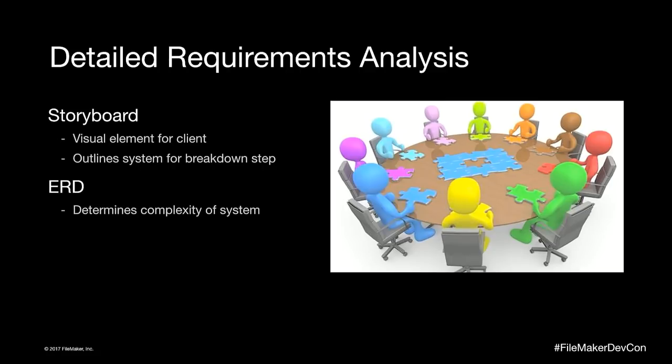So after you do all the asking and listening and writing down your notes, then you're going to do your detailed requirement analysis. And that's where you're going to put together your storyboard, you're going to put together your ERD so you can tell how complex the system is going to be, and we're going to talk about that now. I'm going to show you a couple examples of storyboarding, and then how we're going to use that to break down our estimate.